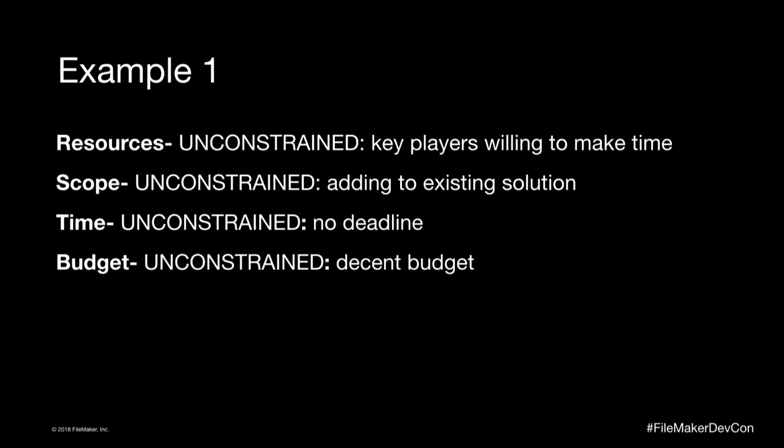So in my mind, the approach that I would take would be to make it agile. We probably already have a great relationship with the client since they're trusting of us and they want to already give us the next part of adding on to this solution. We can make modules that we add on to the existing solution, and we can do it in 2-week sprints where we are providing our own kind of timeline and our own kind of budget for ourselves.